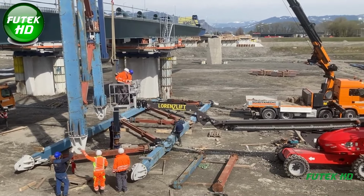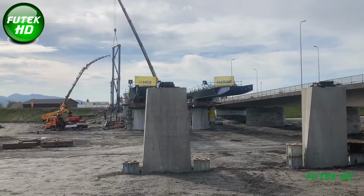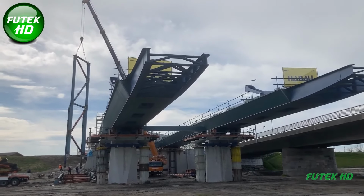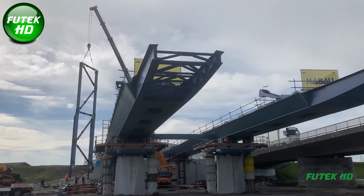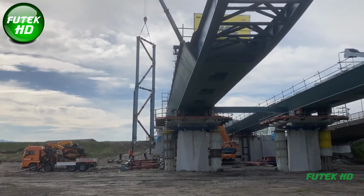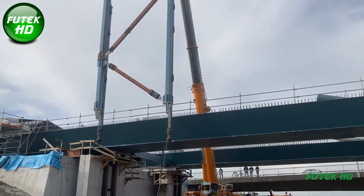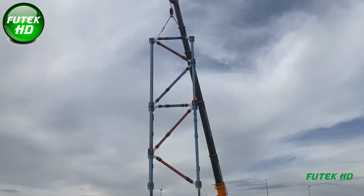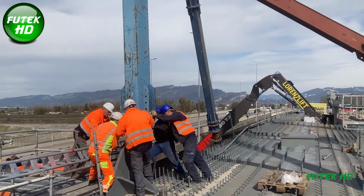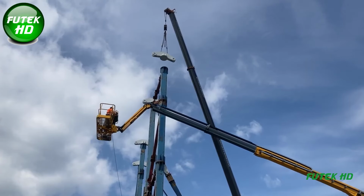In June 2021, the steel box girders were pushed across the Rhine's central channel for the first time. This stage marked a significant milestone, reflecting the complexity and precision required for the bridge's construction. The incremental launching process subjected the bridge to changing stress patterns, influenced by factors like solar radiation, temperature variations, and wind. Engineers and specialists monitored these variables closely, as well as potential ground settlements, to address any unexpected shifts in structural integrity. The Rhine Bridge Hard's design is not only functional but also architectural.